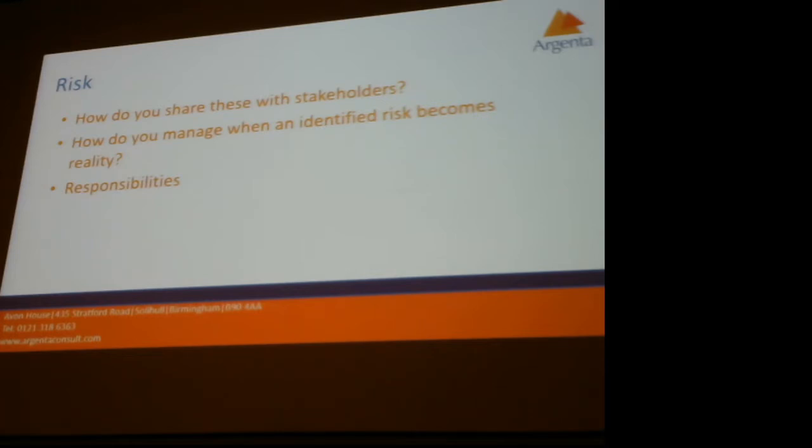I think you've got quite a few people that need to be informed about this, right? Because once you start a project, you need to communicate this to everybody involved, making sure that people aren't expecting things that you're not going to start doing yet because you need to focus on the riskier things first, which is typically how most people would approach it. So you bring those risky things right to the front. I think this virtual machine thing is pretty cool because you can really start to bring those risky things forward if you've got to set things up. And if you can do that via a virtual machine, that's quite a nice way of handling some of that.